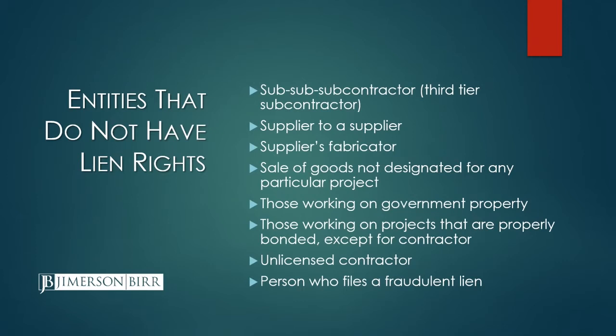And then finally, if an entity files a fraudulent lien, they will lose their lien rights if the lien is determined to be fraudulent. The fraudulent lien statute is Florida Statute 713.31, and essentially it says a lien is fraudulent if it is willfully exaggerated or includes claims for work that was not actually performed, or if it's compiled with such gross negligence that it amounts to a willful exaggeration. A fraudulent lien is a complete defense to the lien claim and strips the lienor of lien rights.